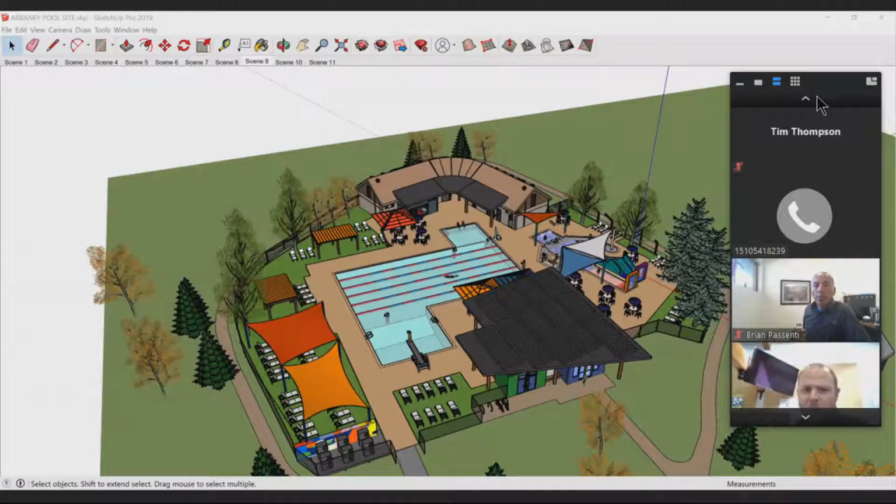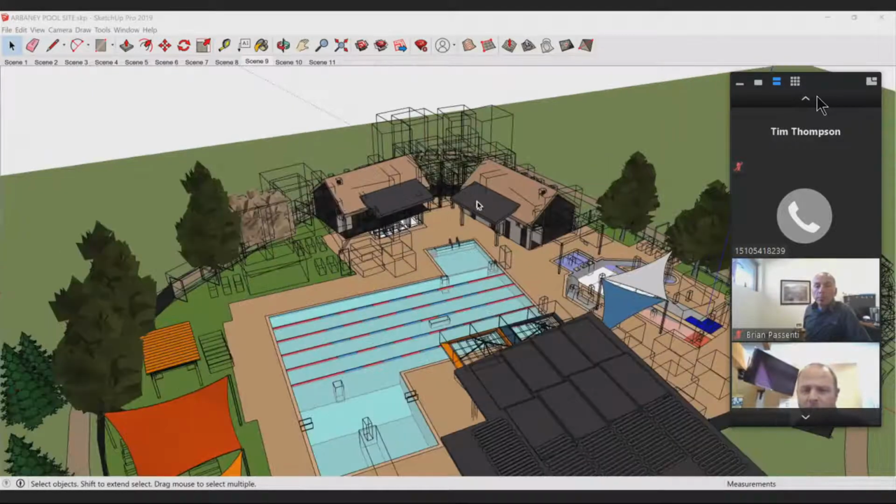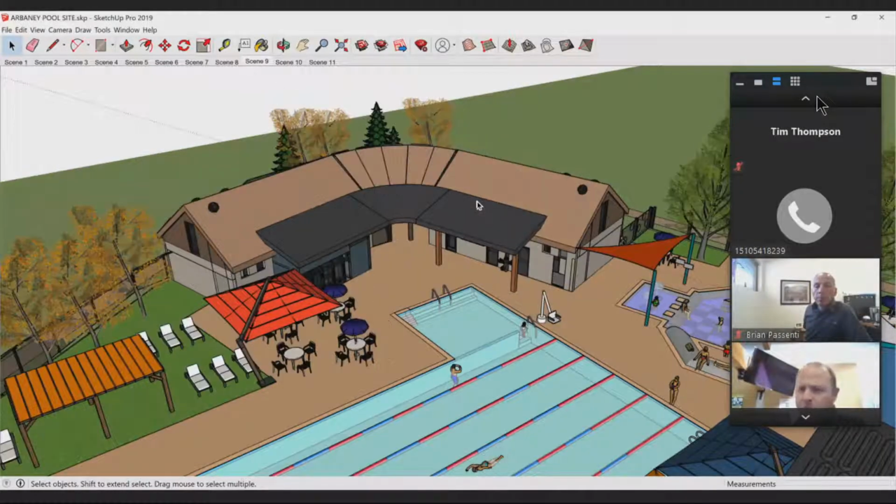You can see here, this 3D model demonstrates what the all-in 4-year plan encompasses, not necessarily what you're bidding on today. For example, this roof overhang and this bump out are not going to be happening in this phase. It's merely a core and shell renovation inside, with the addition and removal of some access points, entrances and exits, and the creation of a new office.